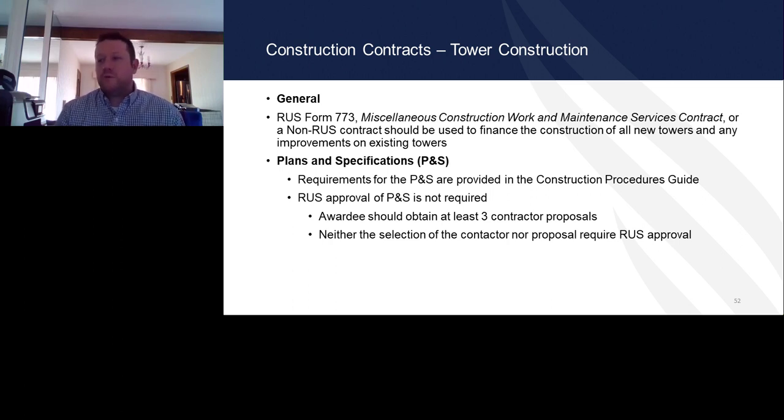The engineer will then review the proposals for compliance to the plans and specs and provide determination of the selected contractor, bid, tabulation of all quotes, and engineer recommendation for the contract award.